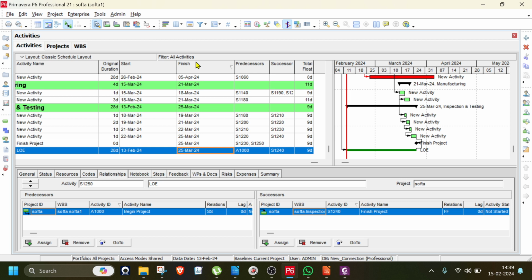Why? I will give you a small example. A project engineer is coming from Russia. He is hired for 5 days, and his task is for 4 days. He came on the first day, so his work has to be finished by the fifth day because he has to travel on the fifth day. We cannot delay. So what is that? Mandatory start, mandatory finish.